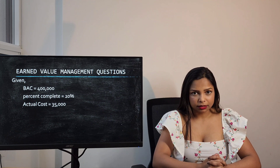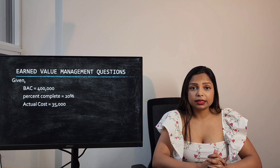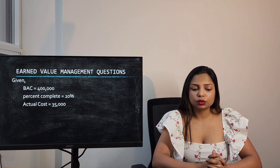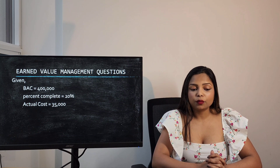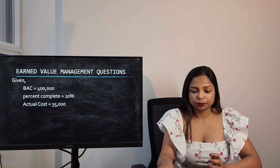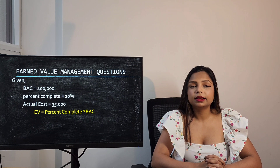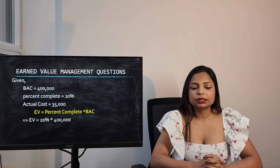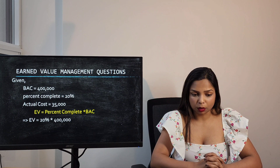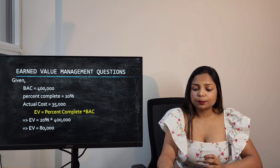In the question, Budget at Completion is $400,000, the project is 20% complete, and the Actual Cost spent is $35,000. To calculate Earned Value, the formula is percent complete multiplied by BAC. Here it's 20% multiplied by $400,000, which gives an answer of $80,000.